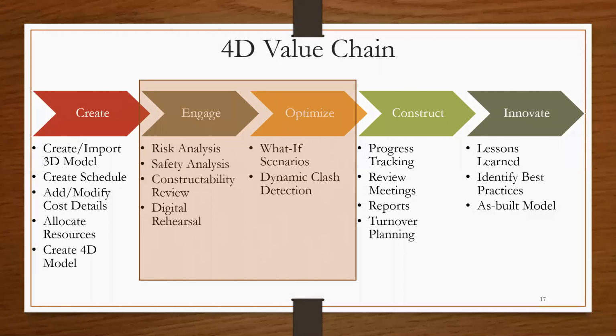Just to also emphasize that at the early stages, when you don't have a 3D model developed already, if you have a plot plan, we can use other software like SketchUp and just develop a reflective 3D model with which you can do a whole lot of the analysis that you need to do before the full complement of a 3D model is fully developed for the project.